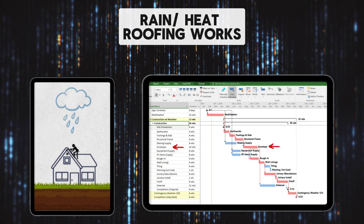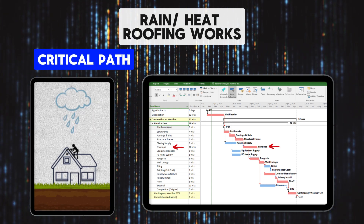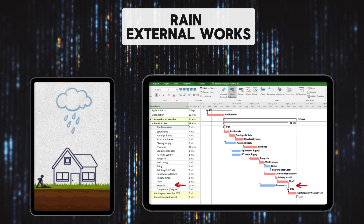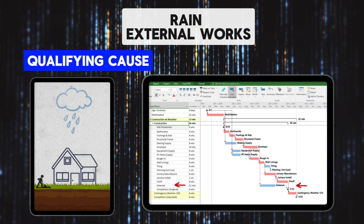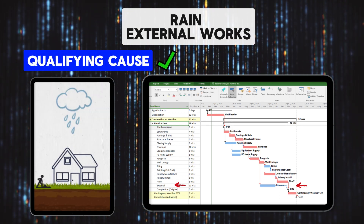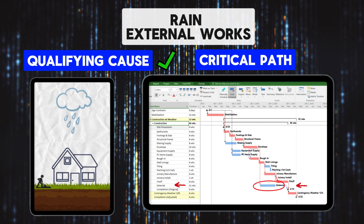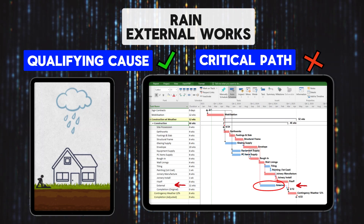Scenario three relates to rain or extreme heat during roofing works. Does it impact the critical path? Yes, it does. Is it a qualifying cause? Yes, it is. So in this example, the builder would be entitled to an EOT as working at heights in the rain should be avoided as it is dangerous and a high risk activity. Scenario four is rain during external works. As we have just discussed, rain is a qualifying cause for delay. However, even though the external works would be delayed, the works are not on the critical path and therefore no extension of time is warranted.